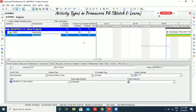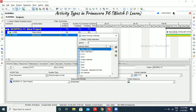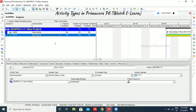I'm just going for the next activity. As usual, we can input whatever duration. By default, you can see it is coming as a Task Dependent activity. What you mean by Task Dependent is that it purely depends on the particular activity — it won't depend on the resource calendar. It depends on the activity calendar. For this activity, we can select the activity calendar from General. Based on that, it will proceed the project; it won't consider the resource calendar at all.